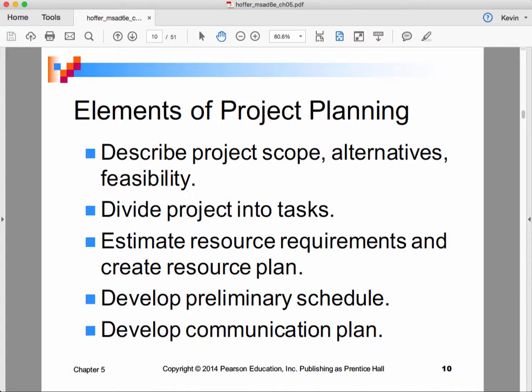There's an estimation approach where the team is asked to estimate every unit of work, which is typically a user story, although it might be some other tasks that have to do with creating just kind of project infrastructure. The team is asked to assign an arbitrary number of points. And then there's an approach to the points.